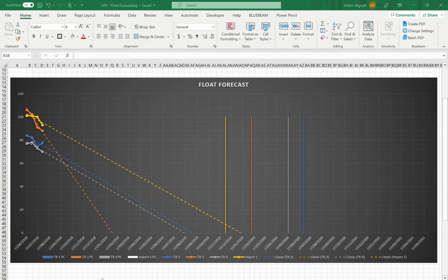Float mapping is a technique used in planning and sometimes in delay analysis to identify slippage and delay across a project timeline. It seems from my experience that it's normally used primarily as a forensic technique, but I'm a great believer in using simple indicators during the delivery phase to see what's happening to a schedule and predict what might happen if the status quo remains.